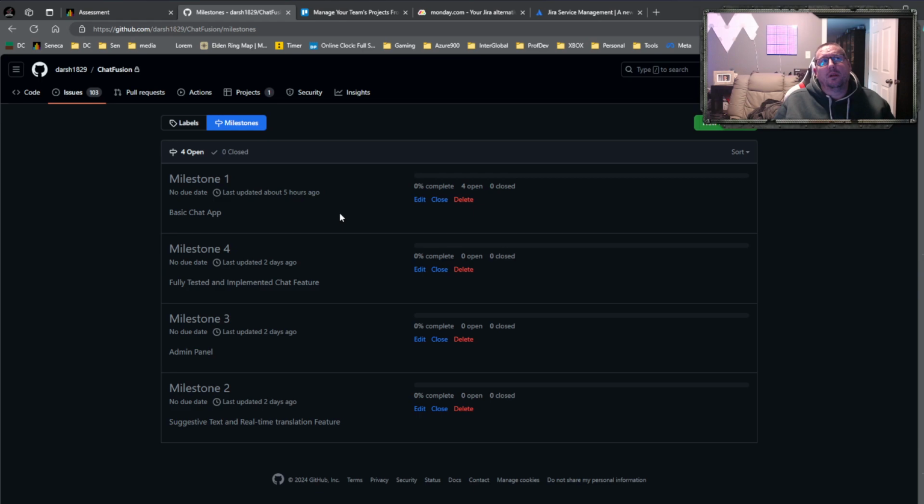The more micro task oriented you go, so the more that your tasks are smaller and you take a bigger task and break it down into smaller tasks, the more you do that, making micro tasks where a task could take 20 minutes or a task could take 2 hours, but a task never crosses between days, all right? Your milestone numbers actually become much more accurate because every task ends up being relatively the same amount of time, and so percent complete actually is a mathematical formula that has concrete evidence.